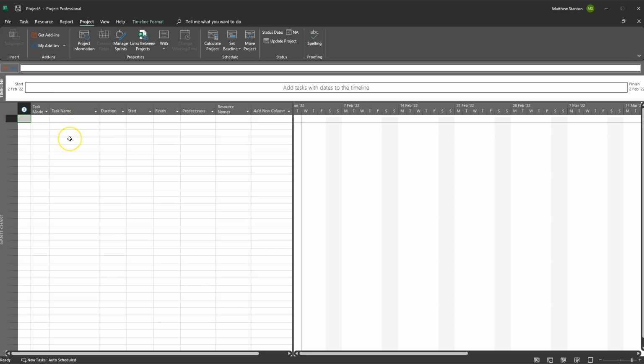Below the timeline is the Gantt chart area where we are going to focus our attention today. The Gantt chart is split into two halves. The project data entry area is on the left-hand side looking like a spreadsheet, and on the right-hand side is where the Gantt chart shapes, tasks, activities and milestones will appear. By default, any tasks that we start creating in Microsoft Project will start on the project start date, so the best thing to do is enter that value.